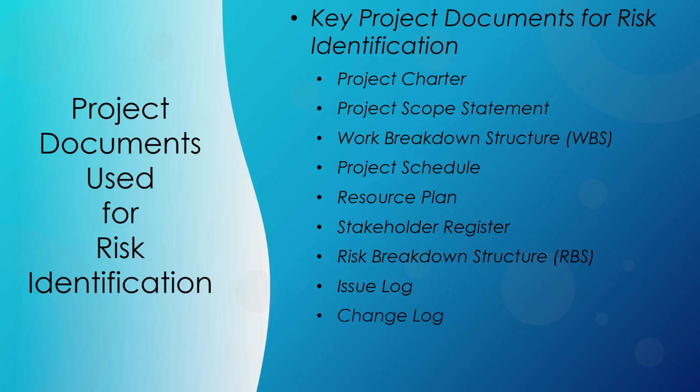The change log records changes to the project scope, schedule, or other project elements. It provides a history of project changes and their impact. Reviewing the change log can help identify risks related to scope changes, schedule adjustments, and change management processes.